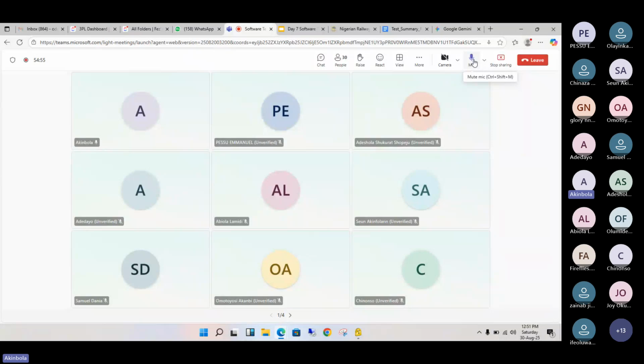You have your test ID, your test case itself, then the status and so on. From there, you can link it up. You can get the data of your summary dashboard from your other workbook. So as you're marking a test case as passed or failed, it's automatically updating on the dashboard. So you have to be good in your Excel calculation, I would say.